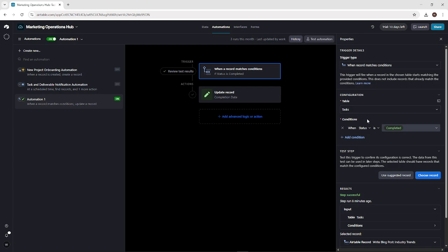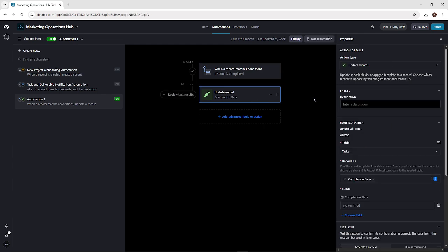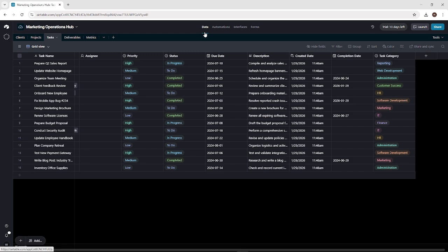Apply conditional logic to make the system intelligent. Use formulas to highlight overdue or high priority work. Calculate project or task completion, and trigger notifications when specific conditions are met. This reduces manual effort and keeps standards consistent.